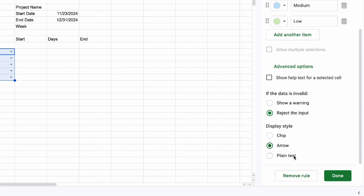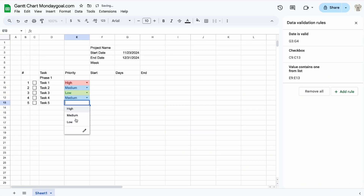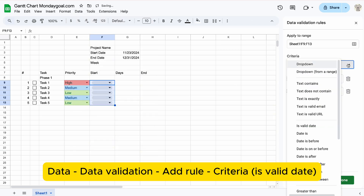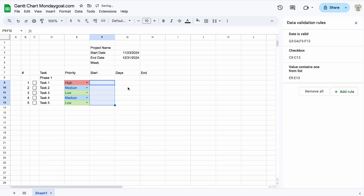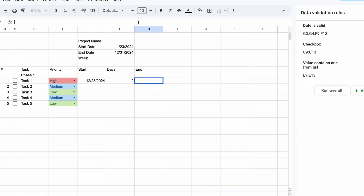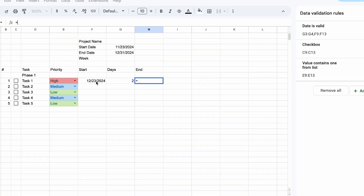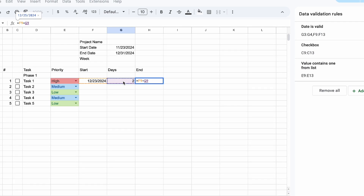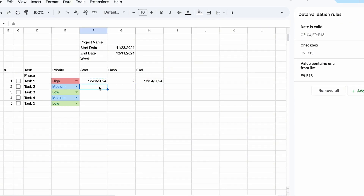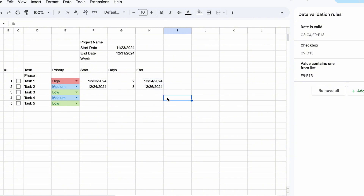Set up priority by inserting a dropdown. Select the arrow display style. Add a date picker to our start date. I want to automate the end date based on the duration. The formula will be start date plus duration minus 1, because we want both start and end date to be included.